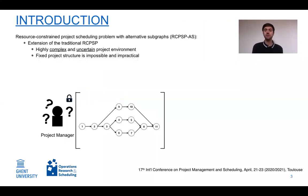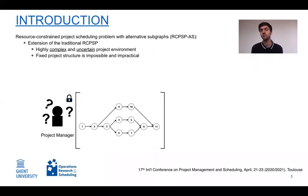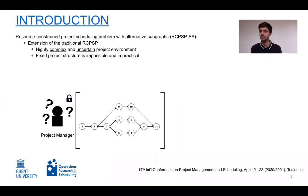In the traditional RCPSP, a set of predefined activities needs to be scheduled subject to precedence relations — or technological relations — and resource constraints, with the sole objective of minimizing the project makespan.